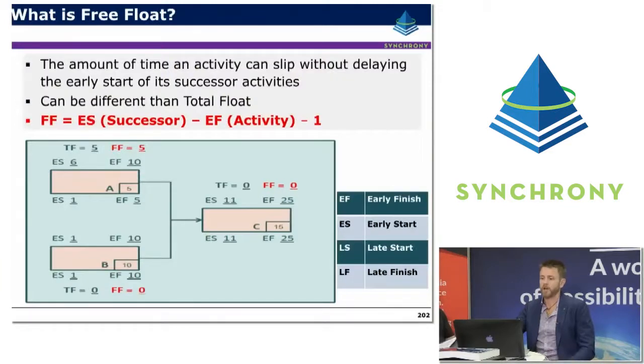Free float is the amount of time an activity can slip without delaying the early start of its successor activities. It has far less significance and doesn't need anywhere near the same emphasis as total float. The reason free float becomes interesting is because we can move activities around when they have free float. If we have limited resources or something like that, some of these activities can be moved around fairly easily.